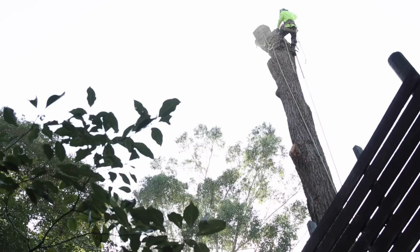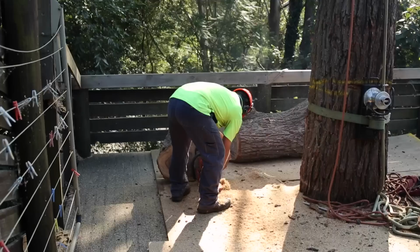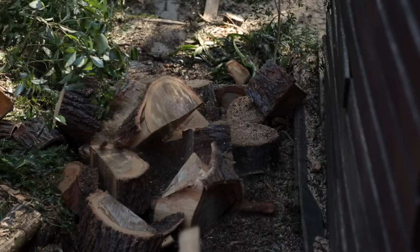If you look behind and upwards, we've probably got about 4 hours to remove the stem. 4 hours work left. We'll be able to chop those down in, say, 2 or 3 meter pieces until we reach the point where the friction drum becomes useless, and we've put in 4 sheets of plywood on a kind of floating floor, and we've got the scaffold guy coming in to build a framework around the remainder of the tree so that we can bring it down in small pieces.